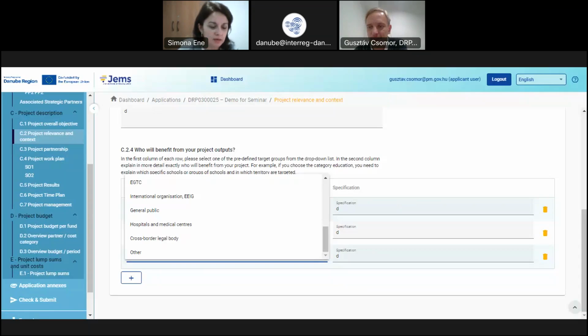So basically, if one person is not working full time for the project, the full salary should not be reimbursed from the project. So this is the principle. But if a financial colleague is here, they can provide more information.